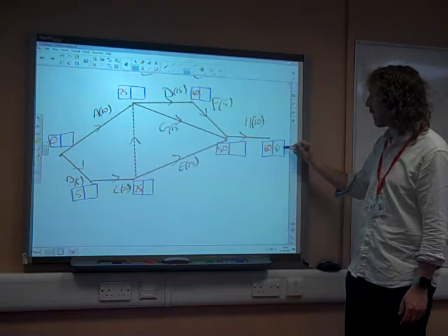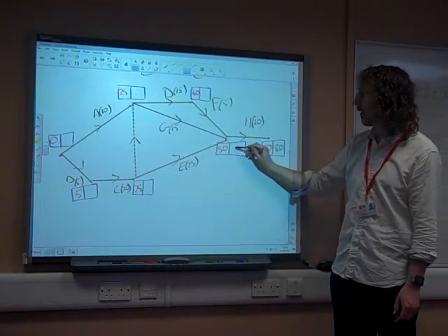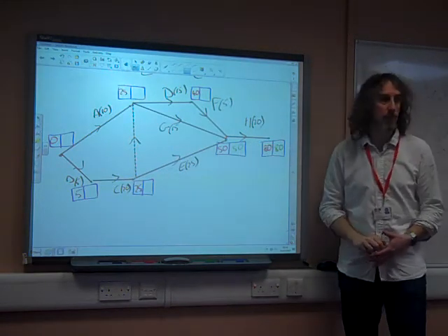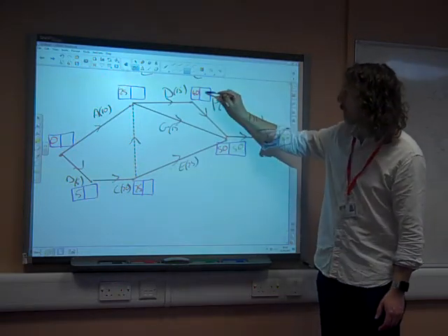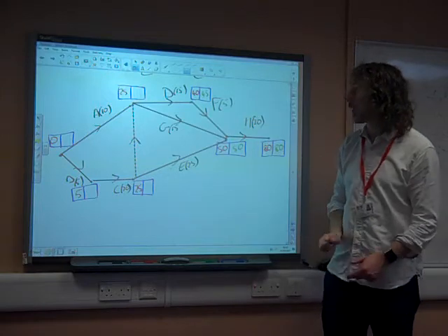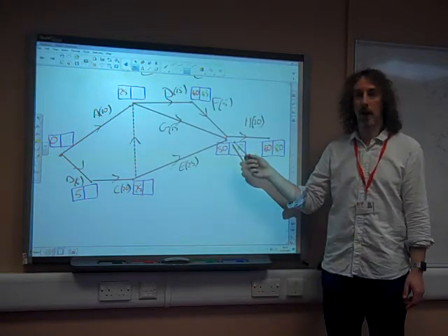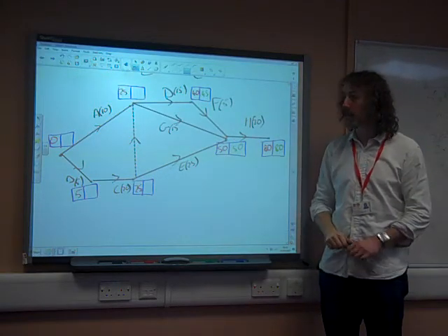So we're going to put 80 in that box. 80 take 30 is 50. That one there, 50 take away the 5, we could put 45 in there. As long as F is finished by 50 we're okay, and so the latest it can start is 45.